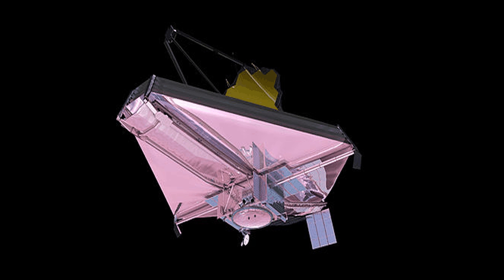While this came close to the final cost of JWST, the first NASA design considered in the late 1990s was more modest, aiming for a $1 billion price tag over 10 years of construction. Over time this design expanded, added funding for contingencies, and had scheduling delays. By 2008, when the project entered preliminary design review and was formally confirmed for construction, over $1 billion had already been spent on developing the telescope, and the total budget was estimated at about $5 billion.